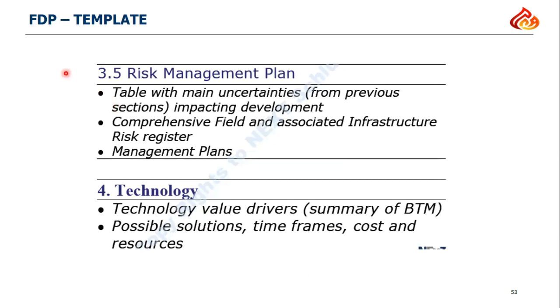And we shall make some risk management, because all of the data in the petroleum industry has some uncertainty. Uncertainty in, as I said, economics, uncertainty in technical parameters. So we shall conduct this risk management plan: what if this condition happens, what shall I do? How shall I mitigate this risk by using what is called a risk register.